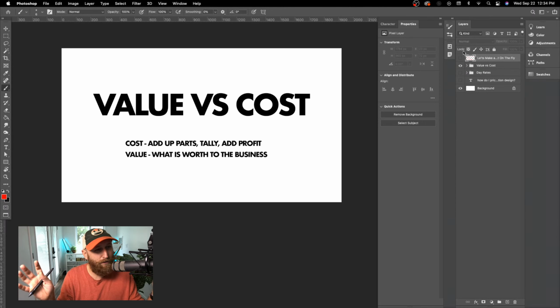But if you're going to use this for the next 3 years and I don't get any royalty, well, then maybe I'd like a 90% profit margin. Maybe I'm going to charge you 10 to 15 grand for my time, and then I want another 10 to 15 grand for you to get my After Effects project file, and now you own this logo animation. So maybe I want like 30K because you're going to use it over and over. That's where that value-based pricing that Chris talks so much about can be really relevant. So it depends. It's tricky because it's not like branding. Branding is always valuable because there's always so much downstream collateral.